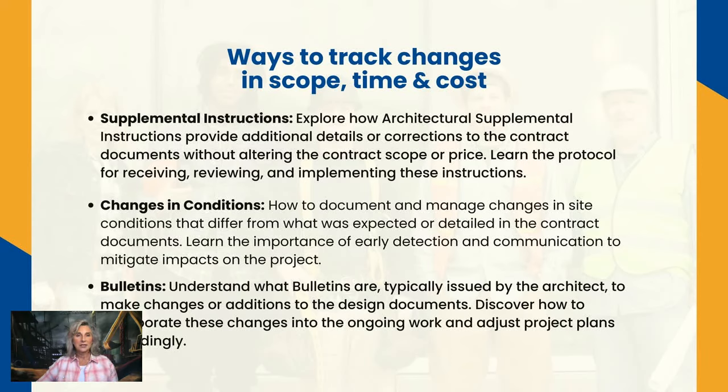Then we have bulletins, which are going to be similar to ASIs. The thing to remember on this, as all of these documents, as they're being approved through these processes, need to be put as-built into the specifications and the drawings, so that you're constantly updating your contract documents and keeping that living contractual document up to date.